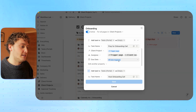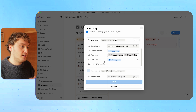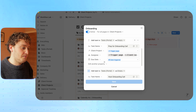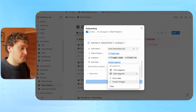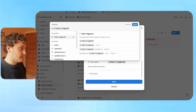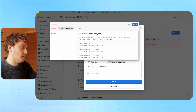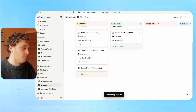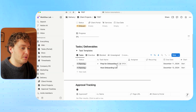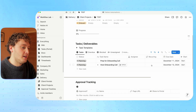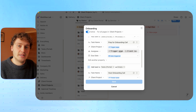As well as that, we now have the ability to say when the due date is going to be. At the moment, I've set the due date to be the date being triggered — so whenever this project is moving to onboarding, just give it today's date. But we can also do more. For the host onboarding call, we want that to happen the day after. We can use a custom formula with a date-add action and say two days after the date triggered. Now if I create a test project, I can see prep onboarding call is due today, December 11th, and host onboarding call is due December 13th.